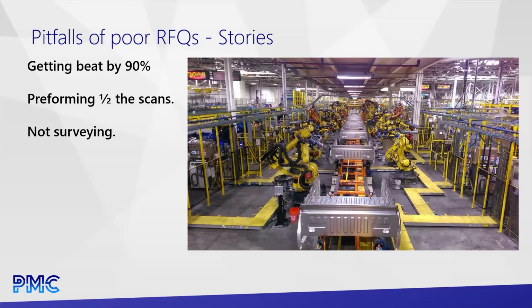Right? Because the reality here in the US is that it's a competitive market for scanning, and all of us have competitive rates. So if they come in even 30% divergent, you probably need to check into it and see what's going on. I would expect them to be much closer than that.